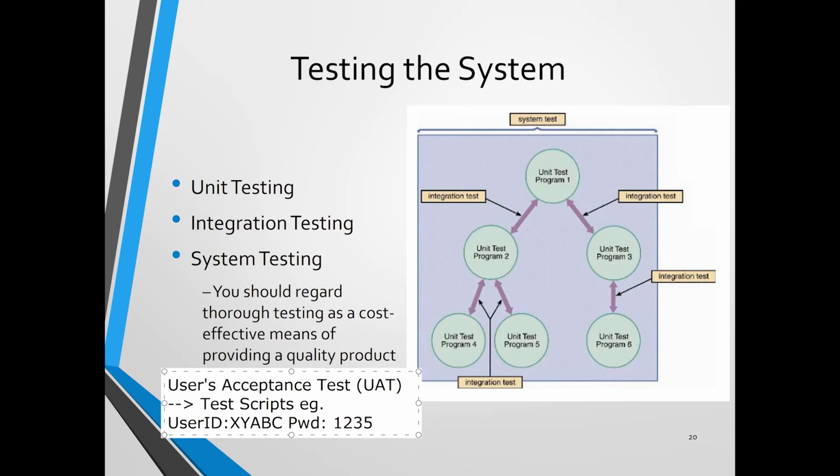until all the scripts have been tested. Why do we call it user acceptance test? If the users test everything already and they are okay with all the results that they tested, you have to let them sign off the document. That means the users accept this kind of system already. They tested it already and they are okay with the results.